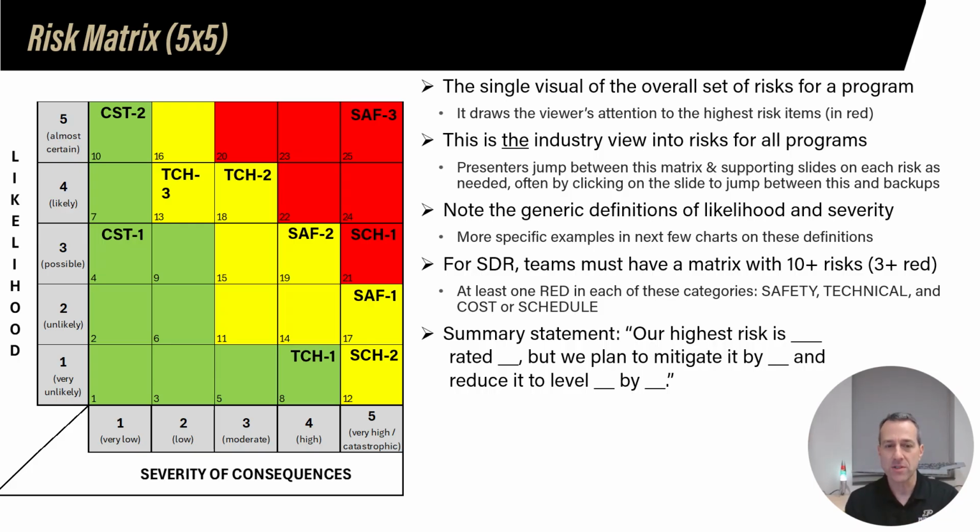This scoring is used often by NASA as a way to provide further differentiation between each of the red squares and yellow squares and green squares in order to better understand what's actually worse than something else. So you have the option of multiplying those numbers however you want, but that's the region that should be red. It should be the upper right corner in that pattern. That's the region that should be yellow on yours, and that's the region that should be green on yours, just so you know.